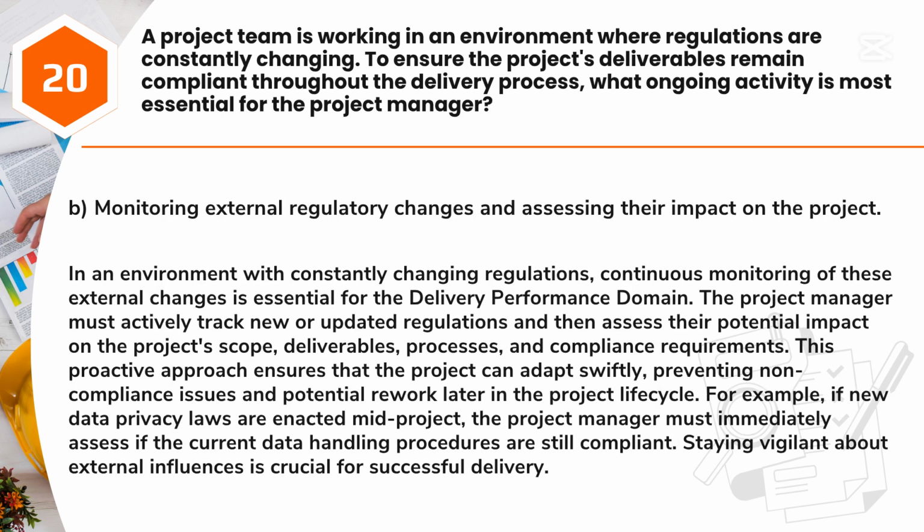Answer: B. Monitoring external regulatory changes and assessing their impact on the project. In an environment with constantly changing regulations, continuous monitoring of these external changes is essential for the delivery performance domain. The project manager must actively track new or updated regulations and then assess their potential impact on the project's scope, deliverables, processes, and compliance requirements.